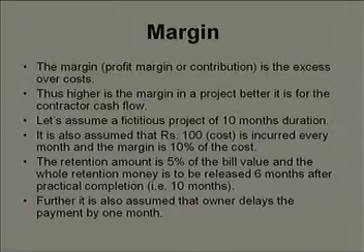I am further assuming that margin is 10% of the cost. That means, if I have spent 100 rupees, I will be billing for 110 rupees, because 10 is my margin on rupees 100. That is what 10% margin on cost means.